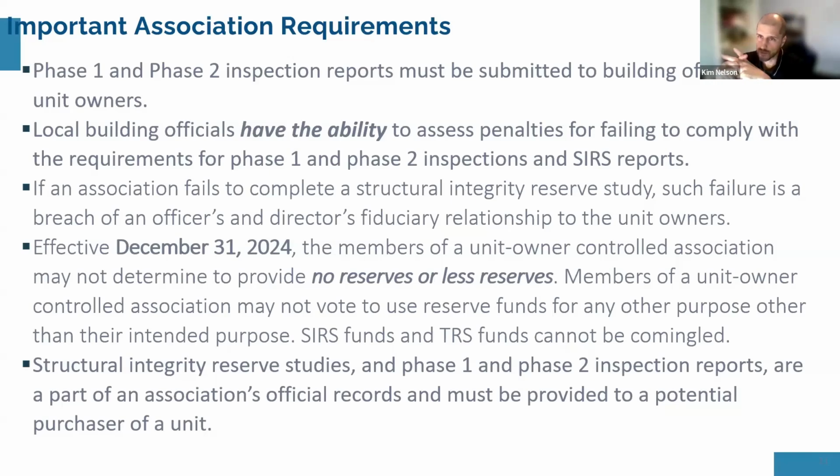So those buildings that are 3 stories and taller or 50 feet and taller are called threshold buildings in the state of Florida, and they're subject to the milestone inspection. And the milestone inspection itself is basically a condition assessment of the building, and it's broken into 2 phases.